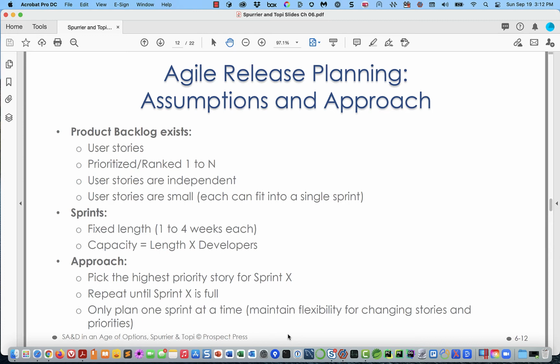Okay. Well, even though the Agile folks say that they don't do a lot of planning, that's the common way of describing Agile. It's not plan driven. They don't do a lot of planning. Well, they do significant planning. And when we read in the Layton book, we're going to see that they do a vision statement, they do a product backlog, and they do a product roadmap.